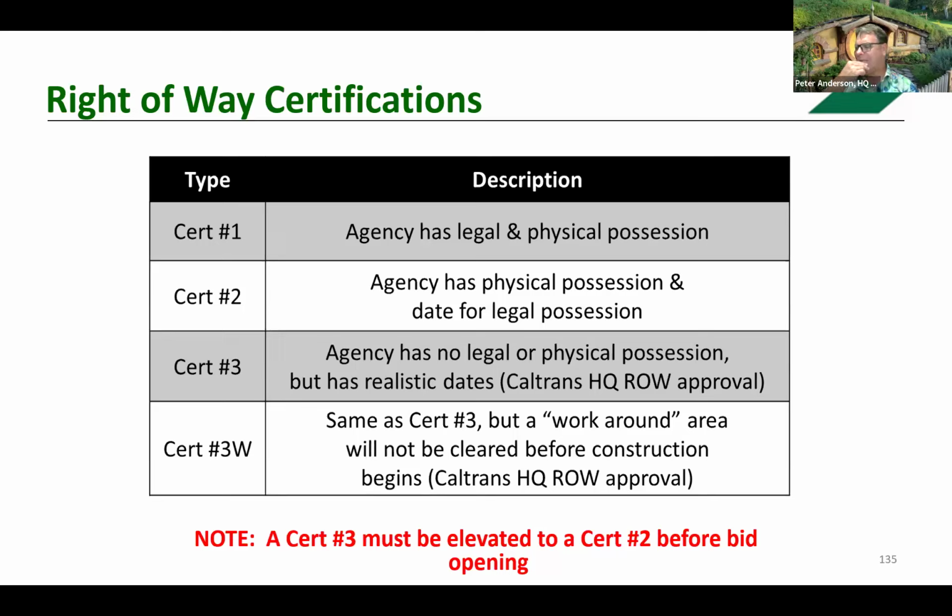Yeah, that doesn't take very long. A week. The NEPA does not have any absolutes in terms of when the certification needs to be redone. The environmental people basically say when it goes to the next phase, consider doing a recertification.